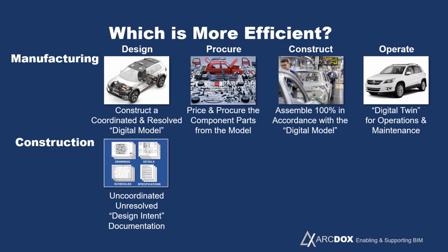As a counterpoint, let's look at the way we do things in construction. So in the design phase in construction, we don't actually work out exactly what we want to build. So we produce some documentation which describes the design intent. In other words, it describes more or less what we want to build, but we feel there's enough information there to get a price from someone.